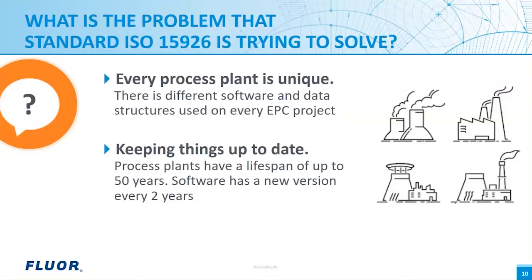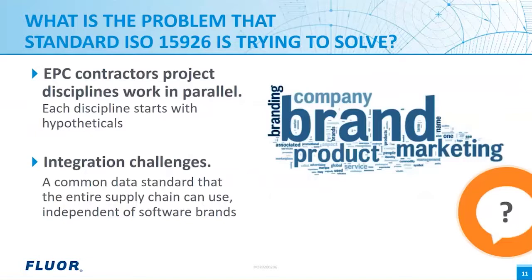Process plants have a lifespan of up to 50 years; software has a new version every two years. The owner-operator would like to renew the software used for operations and maintenance, or for handover with the EPC contractor. EPC contractor project disciplines work in parallel, so each discipline starts with hypotheticals. Data is engineered and once it has a certain status — for example, release for design — it is handed over to other disciplines, which had to start engineering already or worse, had to order long-delivery items.